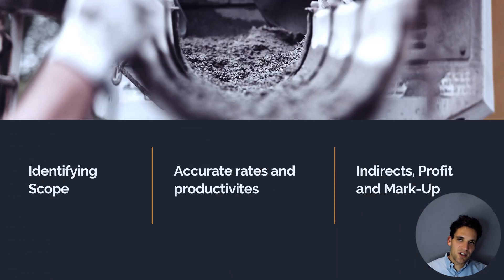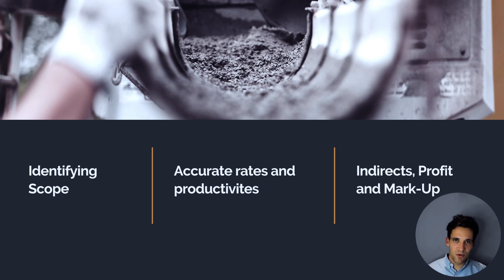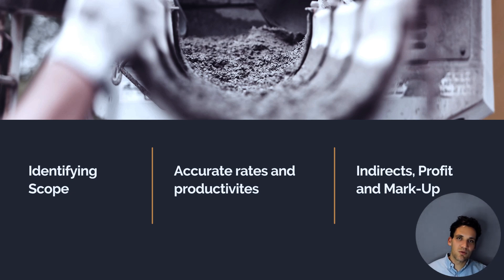In my experience, the biggest challenges to estimating — and how ChatGPT can help — are: first, identifying scope, which is always missed when people are estimating. ChatGPT can help us methodically work through the project to identify scope. Second, it can help us come up with accurate rates and productivity — when we need to make assumptions like how much someone can trench in a day or how many piles they could install on a shift. And finally, it can help with putting the entire estimate together and making sure we're applying reasonable indirects, overheads, profit, and markup.